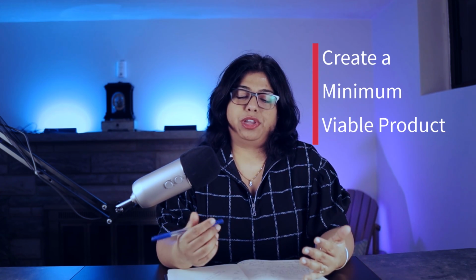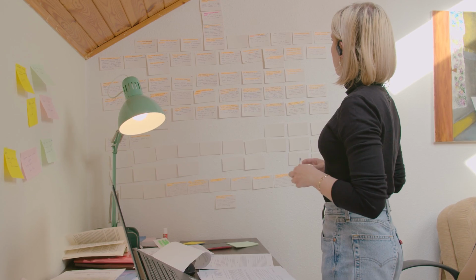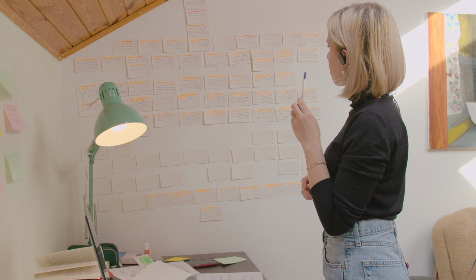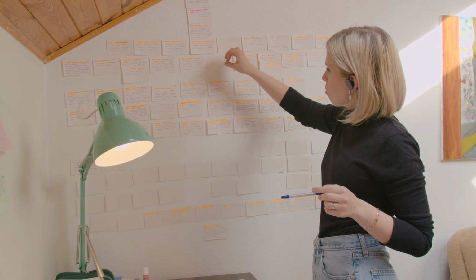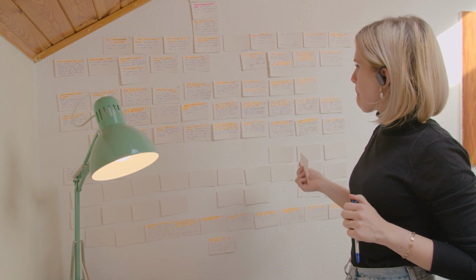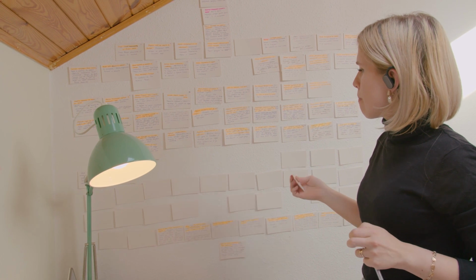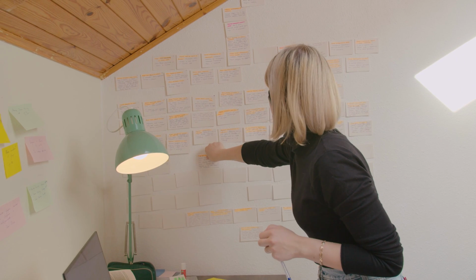The other advantage, which is very important, is this definitely helps us carve out a minimum viable product. If we know that there is a phase rollout and we are aiming or planning items that can be delivered in the first phase rollout versus the second, knowing the estimates will help the product owner to take informed decisions along with the stakeholders on which are the features that can be delivered in phase one and which are the features that will have to wait for phase two.